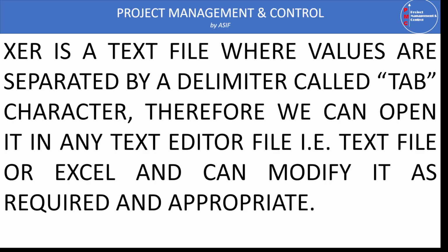is called tab. Because this is a text file and the values are delimited by tab, we can open the same Primavera file in any text editor. For example, we can open it as a text file, or we can open it in Excel, and we can modify it as required and appropriate.